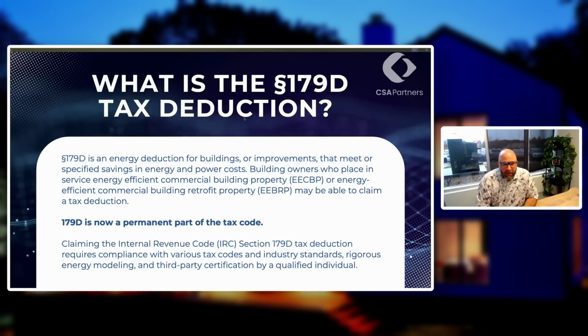So you go to a website, it's actually sam.gov, www.sam.gov. You put in the county where your project is being built, and it'll give you the exact dollar amount that you need to pay your electricians, your plumbers, your landscapers, your laborers. It gives you those wages. And if you're meeting those wages, number one, and number two, if your building meets certain criteria, essentially you do have to have a third party come in and inspect the building.